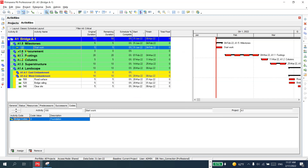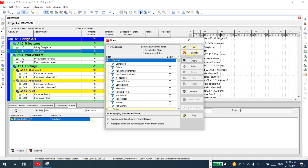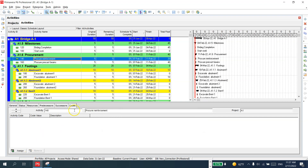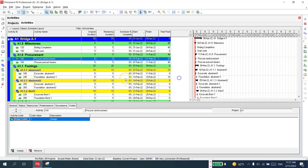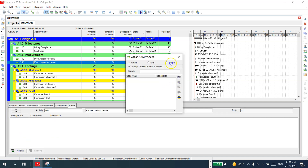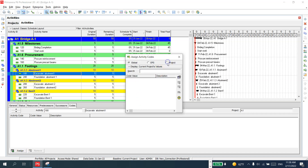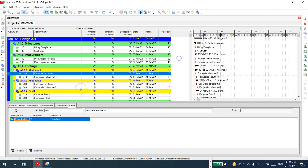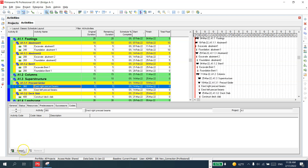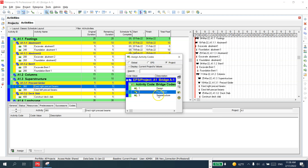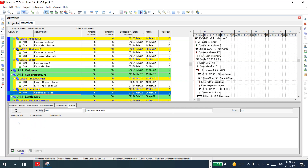I'll add it for Foundations. There's a filter here — apply it. Under procurement activity codes I can add any codes. I'll add it to Design for now. For the beam, the same. For excavations, I'll make it Foundations. Let me add one from Superstructure to show the benefit. I'll assign Superstructure to this one, and also to this one, and this one as well — Superstructure.